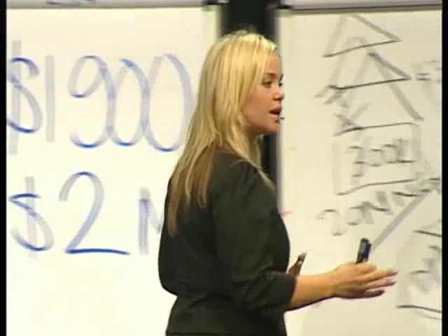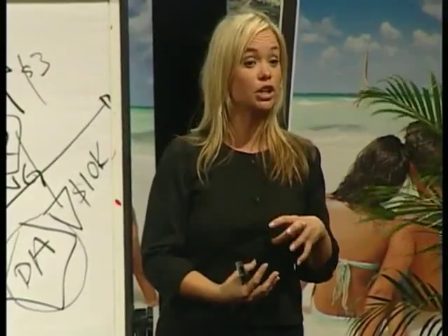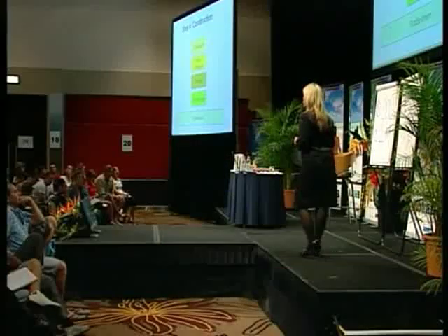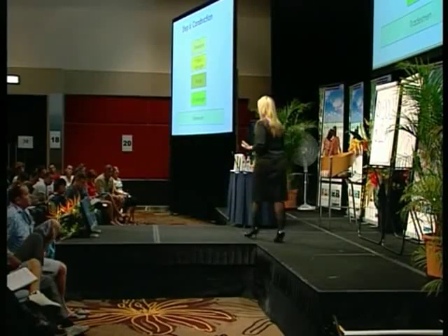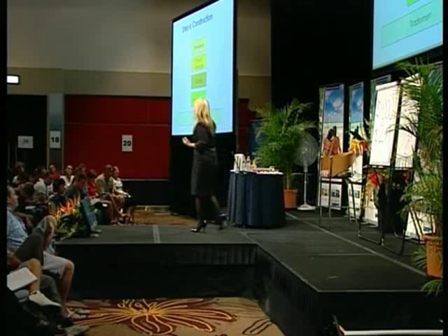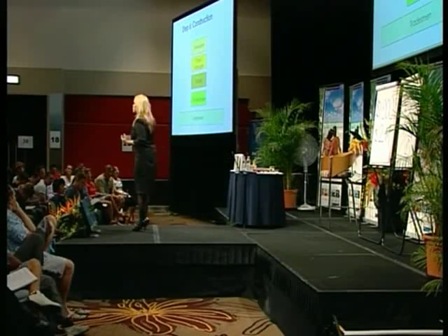Now, once you've done a couple of development sites, you can actually wear the hat of being a project manager. So you can go in and be the person that coordinates everything. The developer is like the CEO. The project manager coordinates everything on a daily basis. The builder makes sure everything's going okay with the tradesmen. The site manager is on site at all times making sure everything's coordinated, and the tradesmen are doing the work. So being a project manager is how you can start to make a salary.